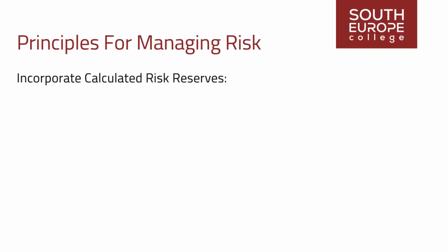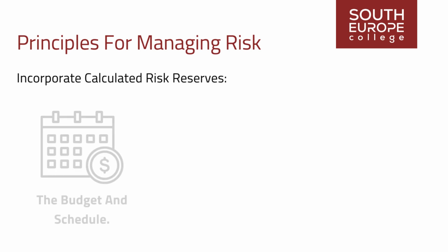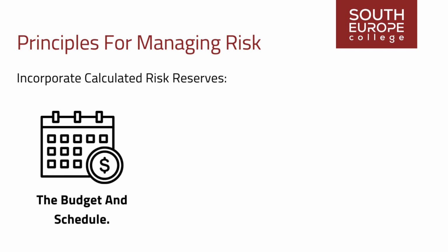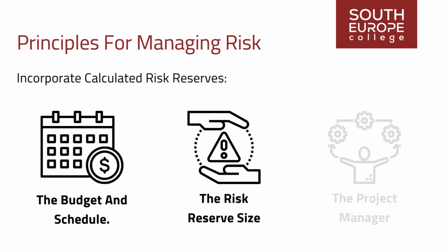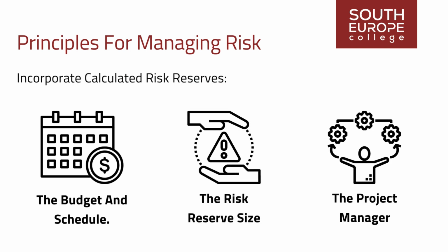Incorporate calculated risk reserves. Include a calculated risk reserve in the budget and schedule to serve as a buffer for managing risks as they manifest. The risk reserve is at the project manager's discretion and covers risks not explicitly detailed in the risk profile. Maintain the confidentiality of the risk reserve size to prevent unnecessary consumption of available time and cost resources.